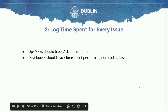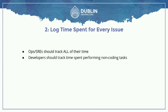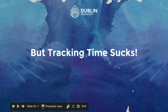The second thing is logging time. You have your ticketing system and you're tracking all of your stuff in there — great. Now you should probably track your time spent on each issue that you work on. For ops and SRE type people, it's important that they track all of their time, so you're able to see what percentage of their time is actually the toil. Developers should probably just track their time spent performing non-coding tasks, so you can figure out how many hours are spent on the stuff not coding.